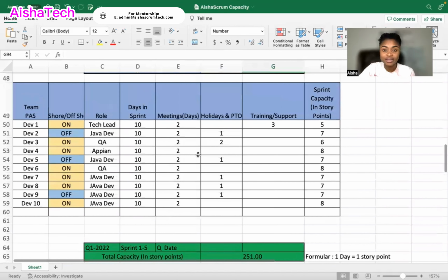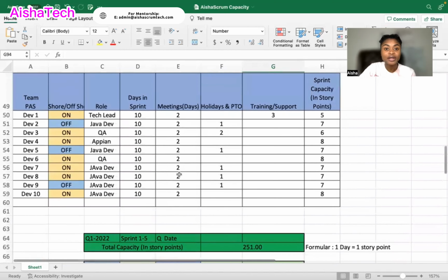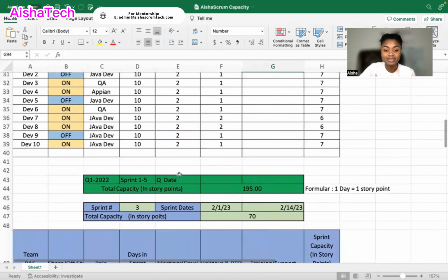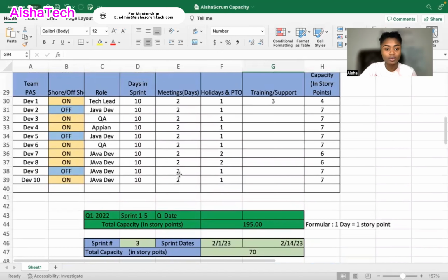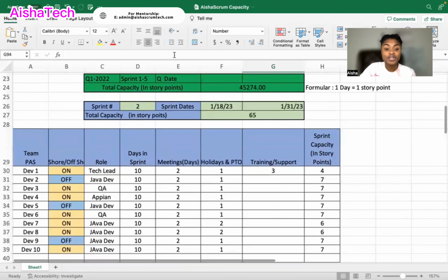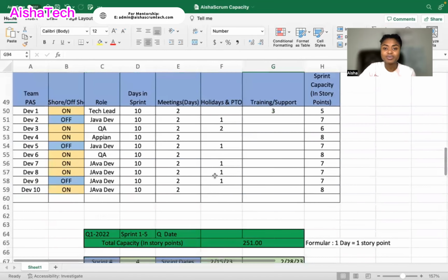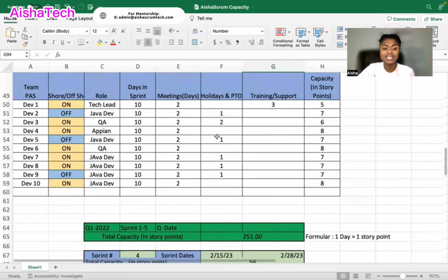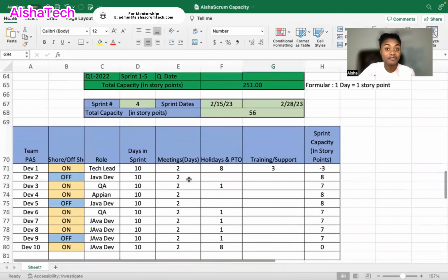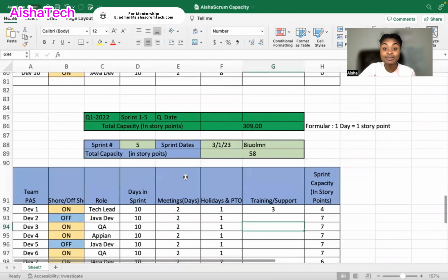You can have half of it already planned, right? I know my manager, one of the SAFe leader managers that I usually work with, has always stated that for the first 2 sprints, you should plan at full capacity. For sprint 3, at least 75%. For sprint 4, 50%. And your last sprint, basically 20% or 30%.